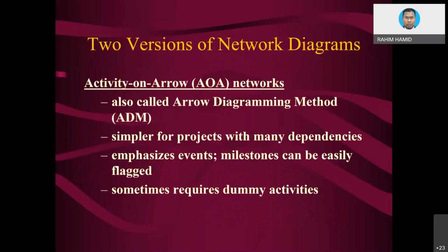Two versions of network diagram. Activity on arrow, AOA diagram, or sometimes better known as AD, arrow diagram, or sometimes better known as ADM, arrow diagramming method. So they are all the same thing anyway. Simple for project with many dependencies, emphasizes events, milestones, etc. Sometimes requires dummy activities. I will explain later on.